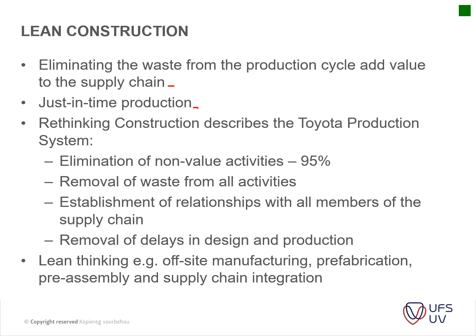Obviously, it's not always that practical, especially if you've got lead times from different suppliers and you do not know whether they're going to have enough stock within a month or two. It might be a challenge to order or to manage this. One way of overcoming this is to order your material so that it sits in their storerooms and they only deliver it a day or two before the time. But another risk is whether you are on time to actually install the items.